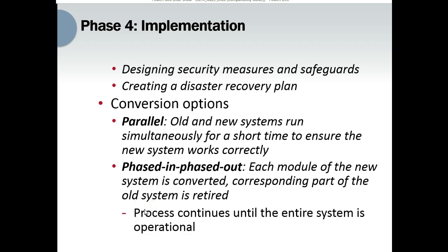In parallel conversion, the old and new system run simultaneously for a short time to make sure that the new system works correctly. This approach could be costly and can be used only if an operational system is already in place. Now let's look at phase in, phase out.